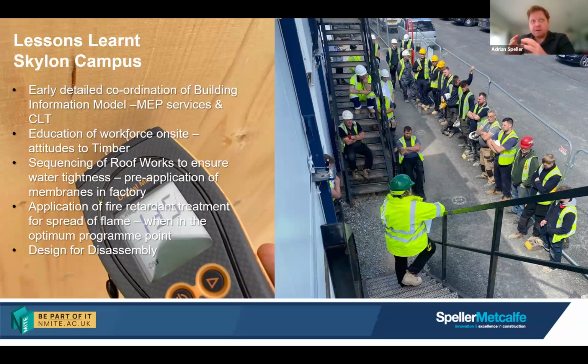I think compared to projects that I'd been involved with previously, there was a need to bring that forward in the RIBA process to enable production timelines and manufacture, but to give that certainty that the CLT and structural frame was coordinated. So I think we had to think outside the box a little bit as to when the deliverables and the detail were needed in the project delivery.